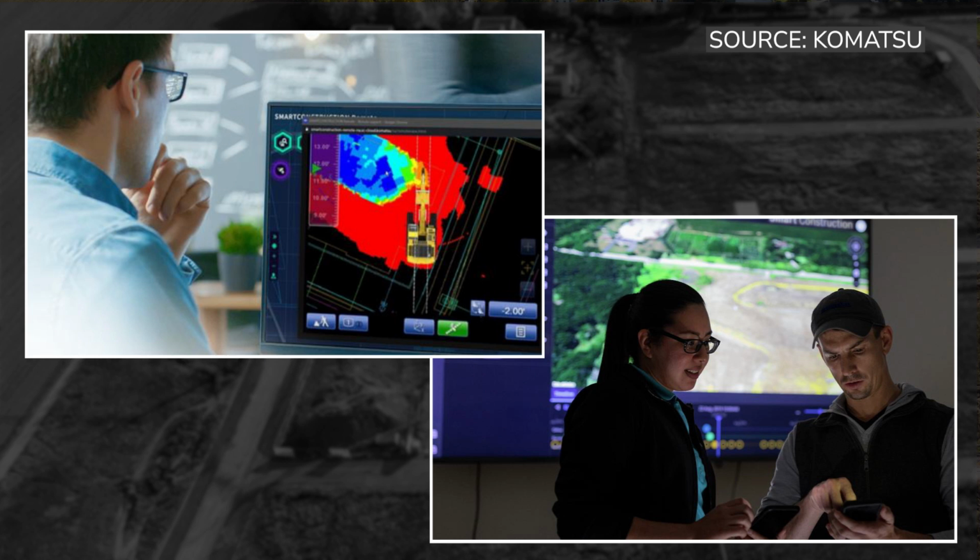I got bad information in that last phone call. So, in near real time, you're able to log on and, let's say at lunchtime, look at what you did in the morning and say, yep, we're doing good. Or actually, you know what, I can free up that asset and maybe move him over to grade those swales or something and take them off of that pad. So that is the name of the game.